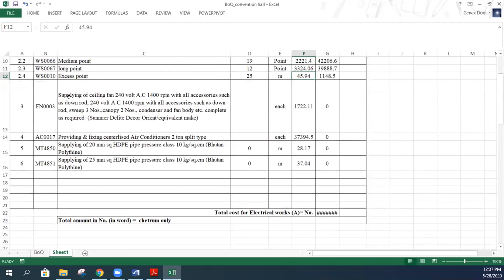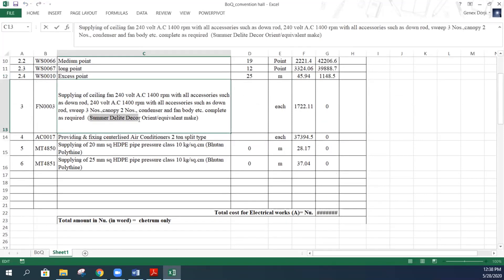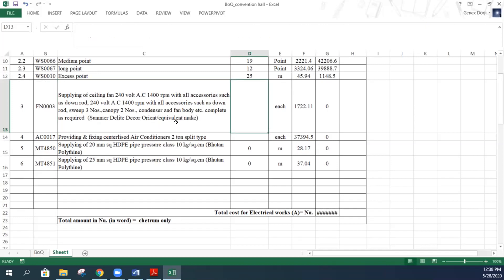For the fan entry, the description is: supplying of ceiling fan, 240V AC, 1400 RPM, with all accessories including download swept 3 numbers, canopy 2 numbers, condenser, and fan complete set. For the brand, you must write something like 'Usha / Delight / Decor / Orient or equivalent make' - you cannot specify only one brand. You must write 'or equivalent make' to ensure fairness to other companies. The quantity of fans is 15, and the BSR rate is Nu. 1,722.11, giving the total amount.